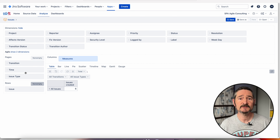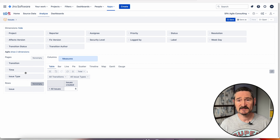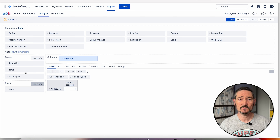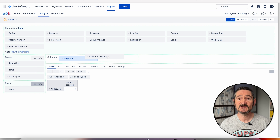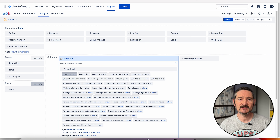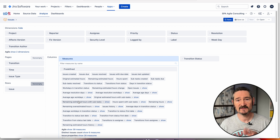I usually only want to see Stories. One thing to mention is I'm using a basic home version of JIRA here, but if you're in an organisation you will have an extra dimension at the top called Team. If you see it, move Team into the Pages section also — that way you can filter by Team as well. Finally, move the dimension Transition Status into the Columns section. Expand Measures, deselect Issue Created, and select Transition Status to Last Date, then close Measures.